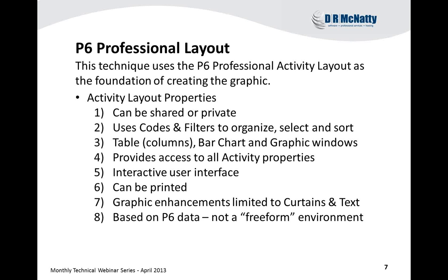So it starts out with a P6 professional layout. So this is the P6 client, not P6 web, that I'm using, P6 professional. The layout has certain properties. It can be shared, so you may have a template that is a global template shared by everyone, and then as people customize them, they may save versions as project-specific or user-specific. A layout will use codes and filters to organize groups, select and sort. I'm going to have columns on the left, the bar chart, to produce an entire graphic.